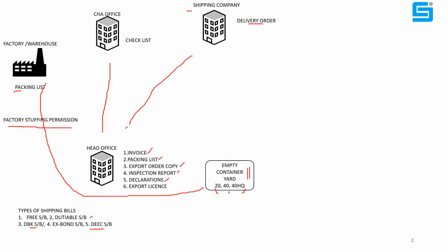When you are stuffing the container into your factory, you need to have valid permission from the custom authorities. Okay, for that you have to apply in advance to the custom authority. I am the regular exporter. I am dealing so and so products. I need the factory stuffing permission for my cargo in my factory.